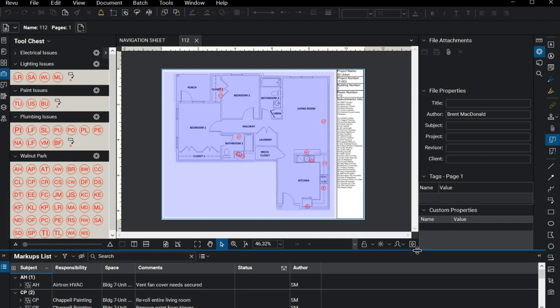It might also be that the owner needs to open at a certain date, and they've only got 30% occupancy of the building at the time, and so you're able to focus on those 30% of the units that are actually going to be leased, get them to a higher quality standard, and then work on the back end to complete the rest of the 70% of those units that need work.